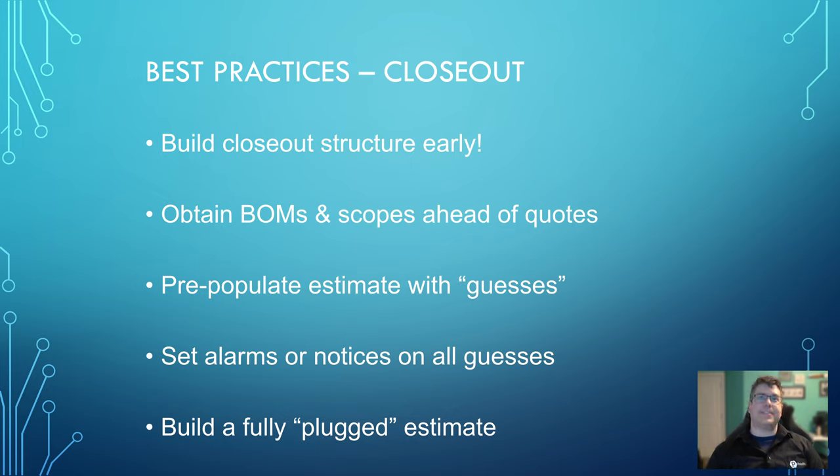Best practices for closeout. Build your closeout structure early. Day one, start looking at how am I going to close this job? What is my end game going to look like? And how do I build for that playbook? Get your BOMs and scopes ahead of the quotes.